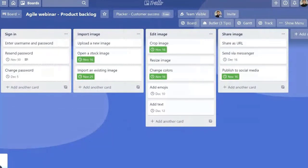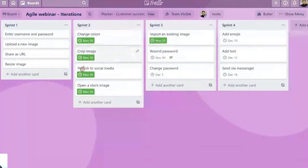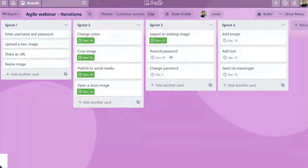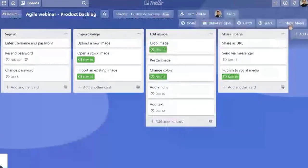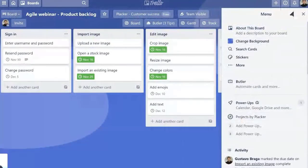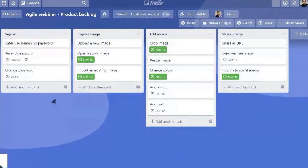How exactly can we create a second board? And how exactly are we going to send cards from our backlog to the Sprints? We can use the mirroring feature in Placker. So if you have the projects by Placker power-up enabled, you can add a card.